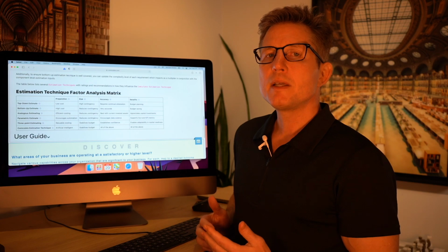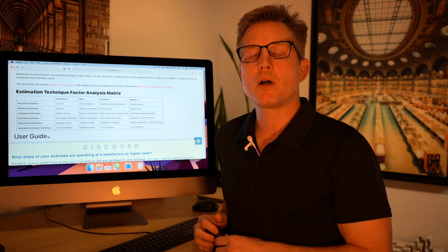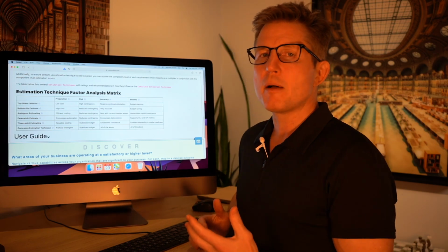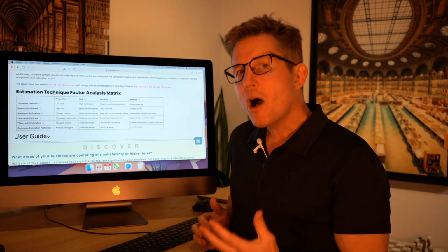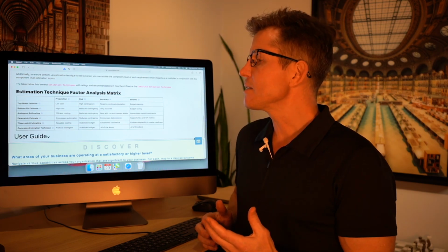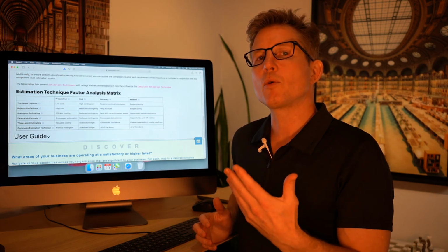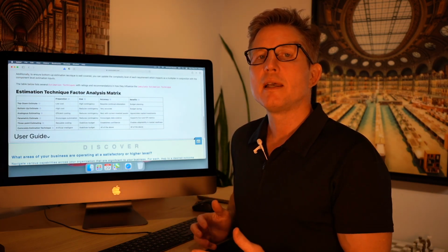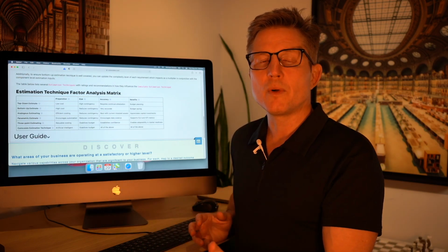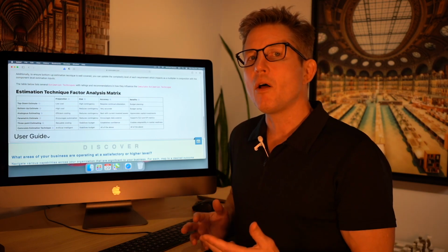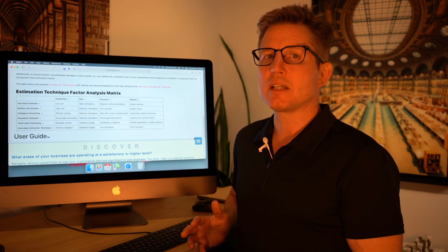The bottom-up is usually the go-to that everybody wants in their project. They want that bottom-up estimate because it provides more accuracy. There's a lot of cost to that though. The cost is when you want to prepare all that information, you actually have to onboard a team, you have to delegate work, and then that team or vendor actually moves forward with collecting all the input required for the estimation. And so that actually is a high cost.